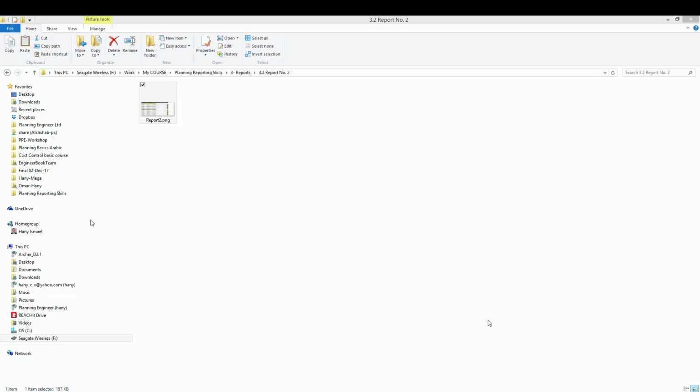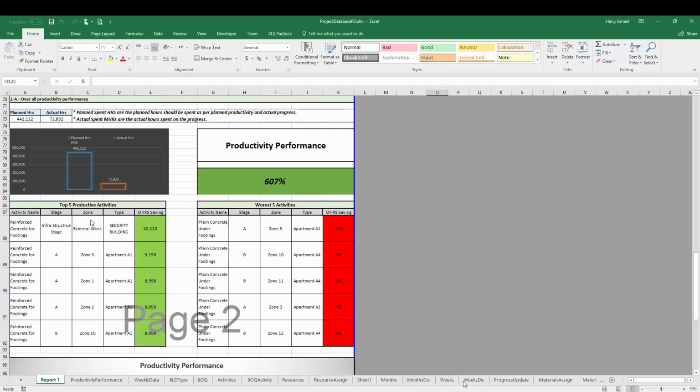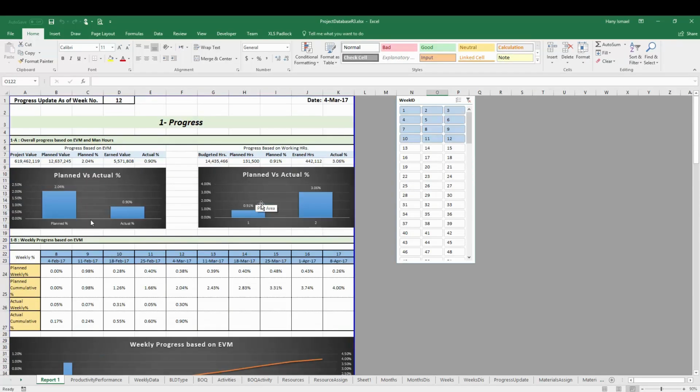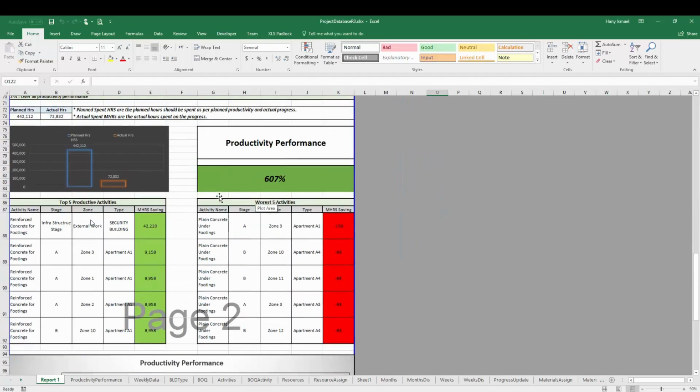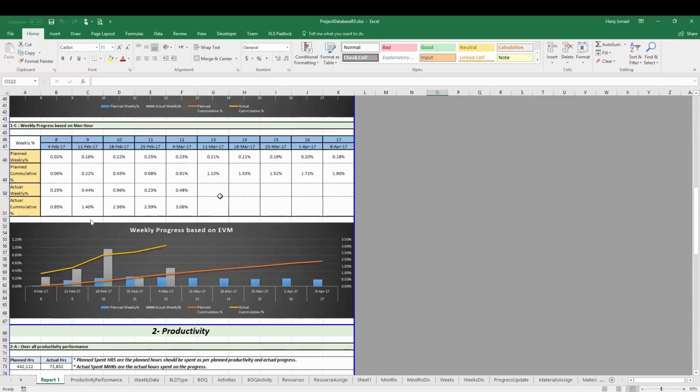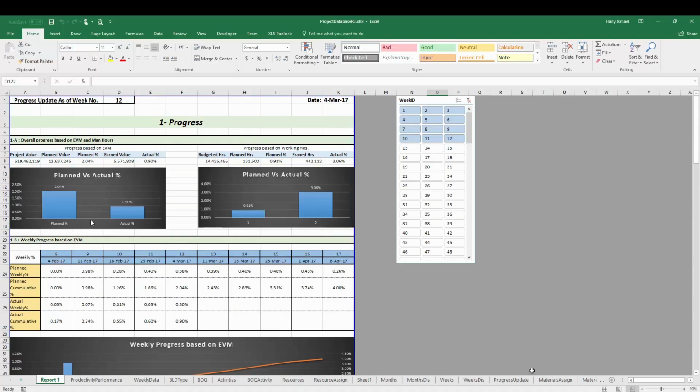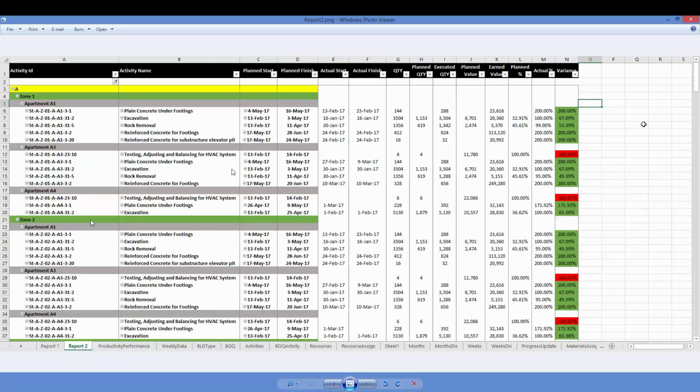In this video we are going to create report number 2. We created our report number 1, and I did some formatting. You can download it from the previous lesson. Now we want to create our report number 2. Mainly we need to show the activities by stage, zone and building type, and show the planned start, planned finish, actual start, actual finish, quantity, planned quantity, executed quantity, planned value, earned value, planned percentage, actual percentage, and the variance between these two.